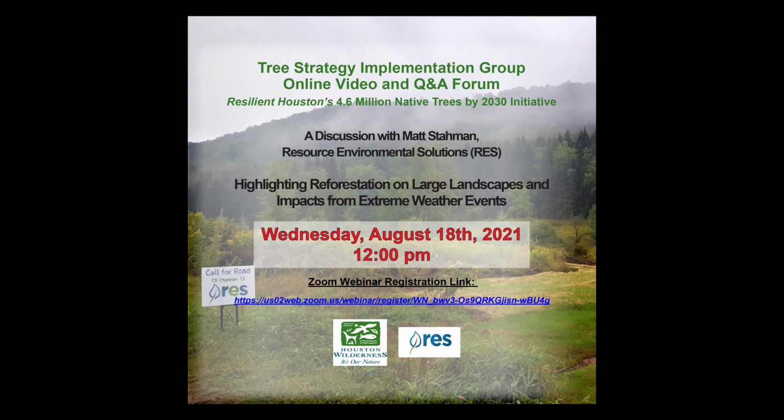That's what we're looking for. In some of our planning efforts, we can have 80% mortality and still be on track to meet that success criteria. More often than not, fewer trees die than we expect, and we're really looking at, now that we're getting into some of these projects that are much older, having to do some forestry and think about coming in and doing some timber management on some of these sites in order to thin some of the trees back to allow some of those more desirable species to get larger canopies and have a greater dominance in some of these areas, especially the oaks and the hard mass producing trees. So that's, if that answers your question.